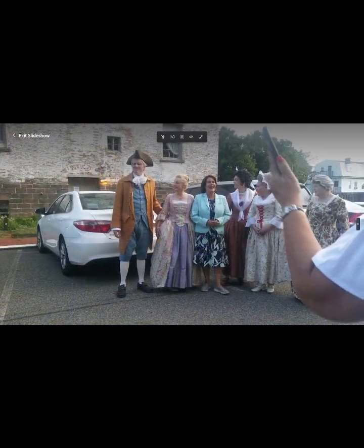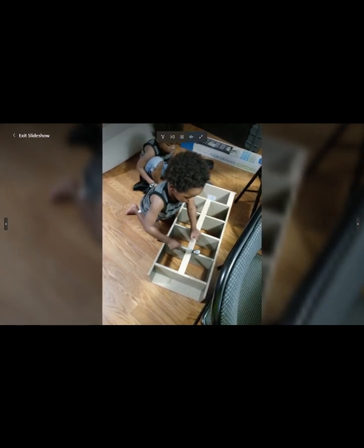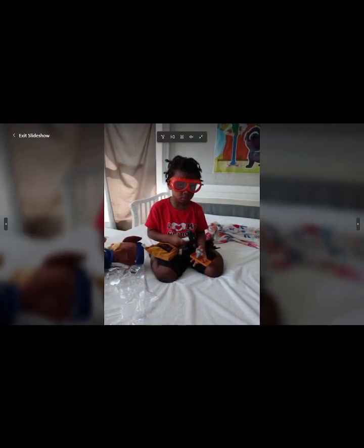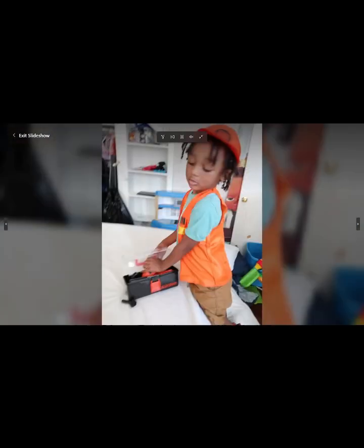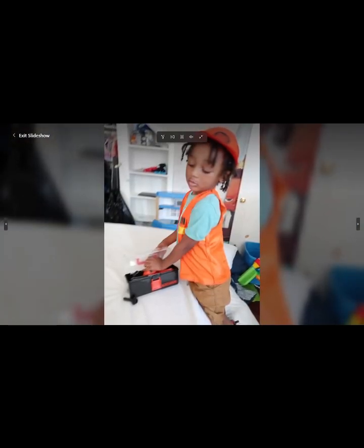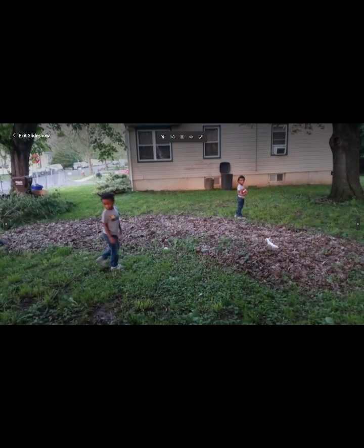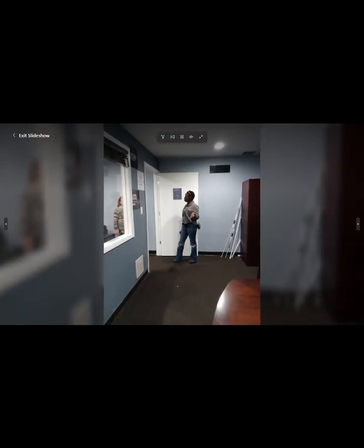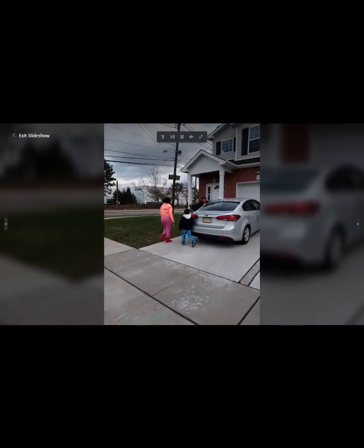Assignment and delegation. Someone is taking over, or is assigned, the obligation of one of the parties to the contract. The party taking over the obligation is called the assignee. Say, for example, that a builder who agrees to build you a house for some reason can't afford to do the job, but assigns the contract to another builder who builds you a house under the same terms and conditions that you and I agreed to. The example is different from delegation, where I simply hire another builder to work for me to build you a house. In an assignment, my responsibilities and obligations are transferred. In a delegation, I remain primarily responsible.